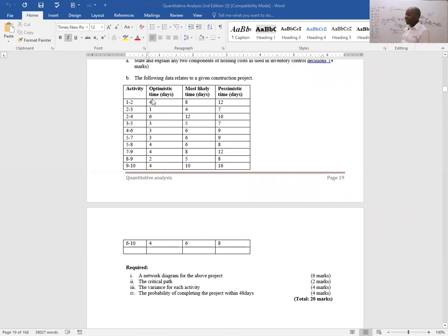Go to B. The variance of B will be 7 minus 1, squared, divided by 36. What am I getting? I'm getting 1. And then we go to C. For C, I can see 16 minus 6, we square this, and divide by 36. I'm getting 2.78. Go to D. I can see 16 minus 6 again, squared, divided by 36.